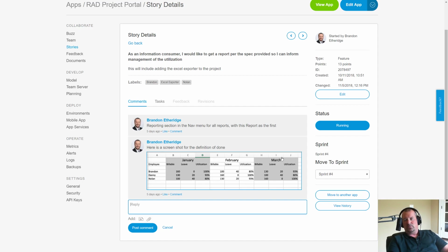I don't have like a best practice to say you should always do it this way, but I do have recommended approaches for this. What I recommend is leaving it in running status, adding a tag that says test failed, or removing the test ready tag, and at least adding comments. So that way it will let the user know that if I worked on it and I don't see test ready anymore in the Sprintr, I'm going to go, it's not test ready and it's not test passed.